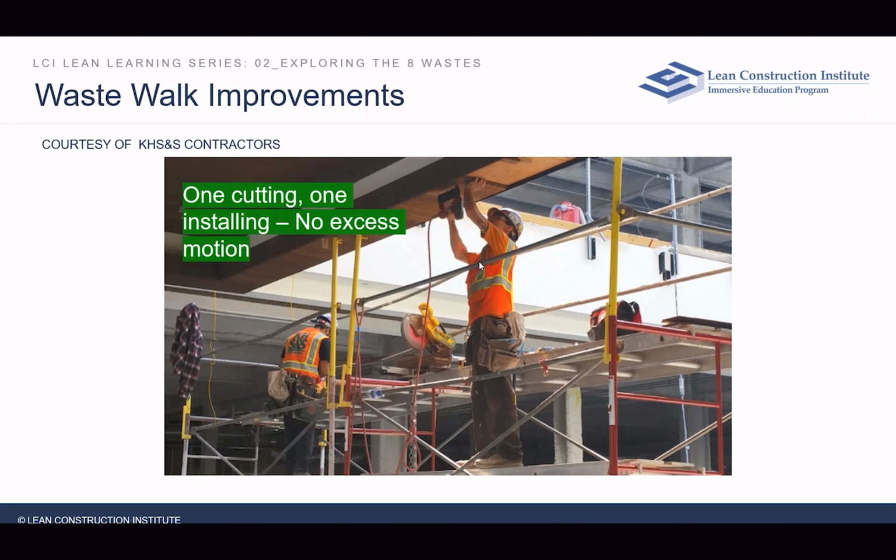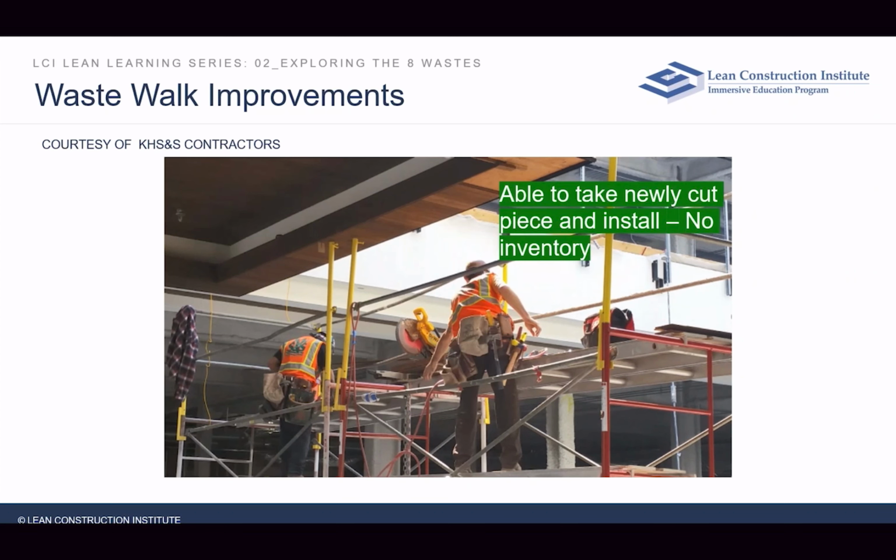So there's one guy cutting, one guy installing. No excess motion. There's no up and down the ladder. There's no risk for injury. There's no third guy bringing materials over and standing over a work product that is maybe finished, maybe not finished. It's all right here. So with one guy cutting over here and one guy installing. Now we have no inventory. So think about it. This guy's now cut the material, slid it over. In the video, you see him slide the piece over, and this guy grabs it, and he goes back and does his work. It's beautiful.